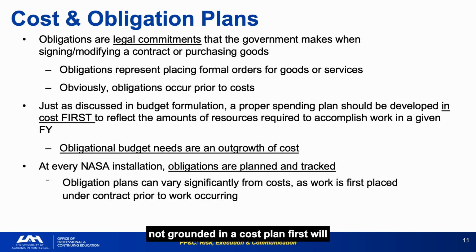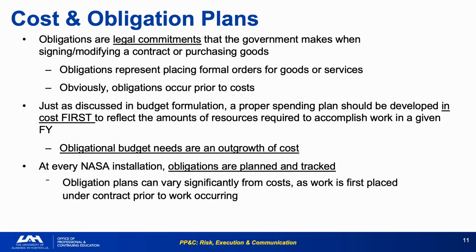Obligation planning that is not grounded in a cost plan first will produce a forward funding structure that may look adequate on paper, but does not reflect when the work actually needs to be done. Discipline yourself to build cost plans from work schedules and cost requirements, then derive obligations from those cost plans. The obligation plan is a downstream product, not the starting point.